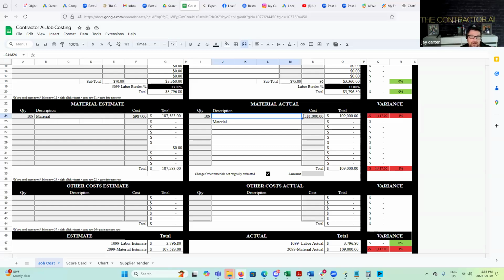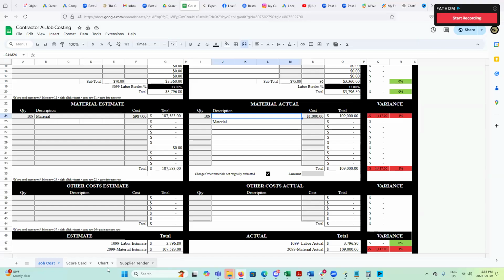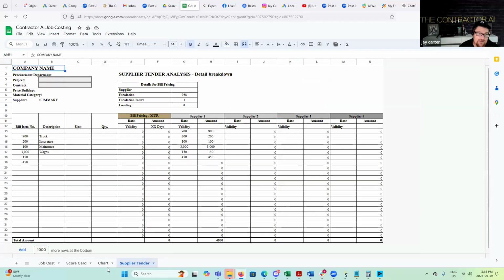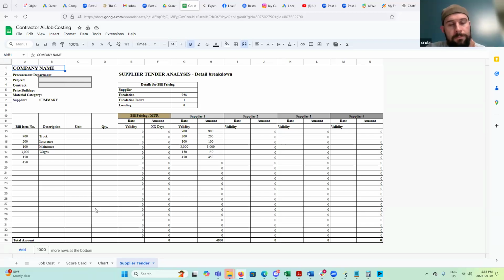And I use a method called trust but check. And how do I do that? Again, this is getting easier and easier. If I have any jobs, you've got all your labor, all your material laid out on your estimate, you get that job to go ahead. Great. How much harder is it to flip this off to 3 suppliers and be like, give me your price, tell me how much this will be for this. And I'm going to compare those prices. And again, what's the difference of 1 to 2% on a job?